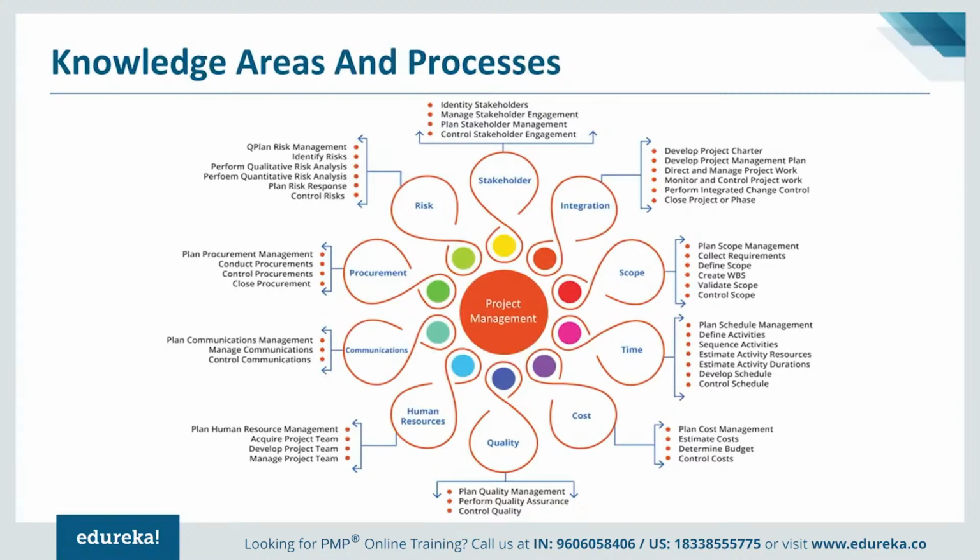So from the point of view of influence of the stakeholder and how much power the stakeholder has, etc. So you create those grids and you try to control your stakeholders through those grids. Some stakeholders you need to manage closely, some stakeholders you need to just keep informed about what's happening, right? So depending on the influence and the power of the stakeholder, you need to take those decisions. And then of course this way you should be able to control it.